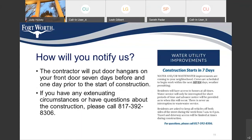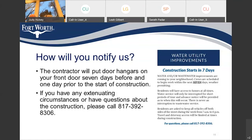How will you notify us? The contractor will put door hangers on your front door seven days before and one day prior to the start of construction. If you have any extenuating circumstances or questions about the construction, please call 817-392-8306 — that number goes to the TPW construction division. The door hangers will also have the contractor and inspector's contact information. They should be your primary contact if you need to coordinate property access due to gates, dogs, etc., as they are on site daily. You're also welcome to call me, the project manager, with questions and concerns.